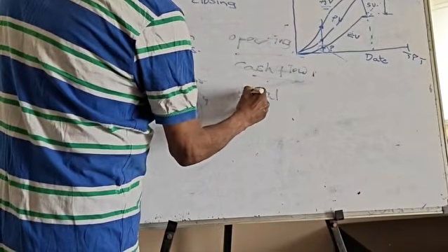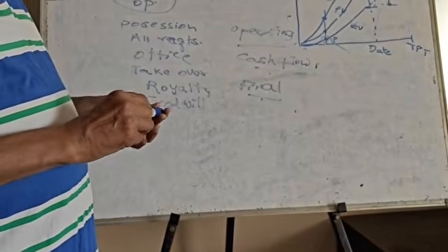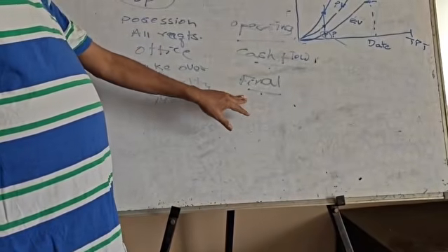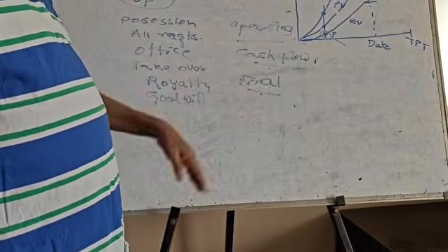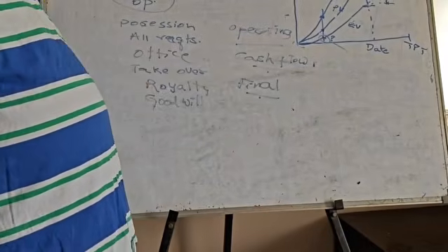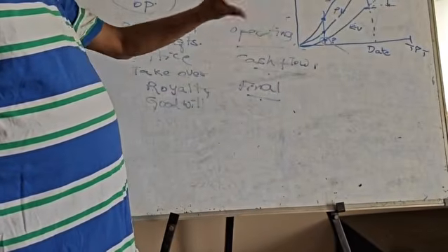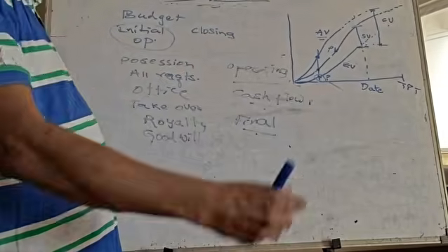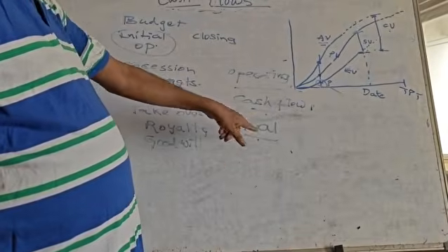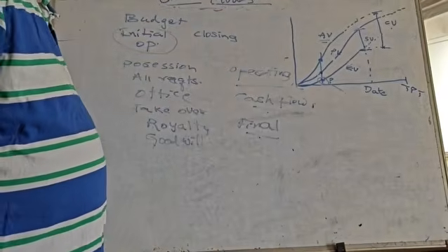Final cash flow is at the end of the project, where you have finishings, for example, where you have aspects like permissions, for example permission from environment, fire, water, all these things, and many things like landscaping, and the final stages, whatever it is for finishings. And closing of the project, closing down and handing over. So all these things will occur in this: the handing over of the project, the closing of the project, and all that. Of course, closing with only 90% of fund, 90% of payment, not 100%, as I told before.